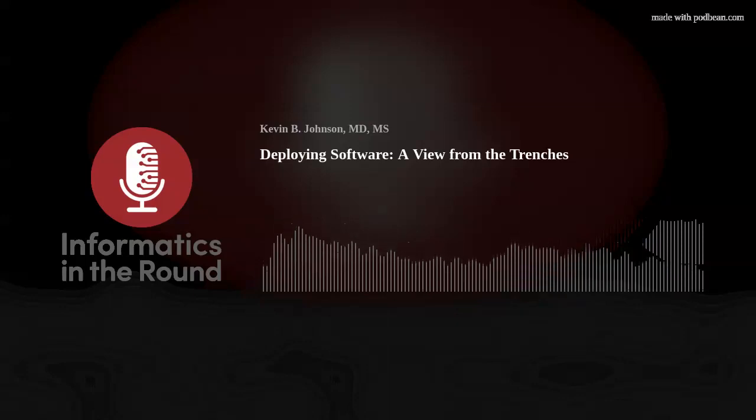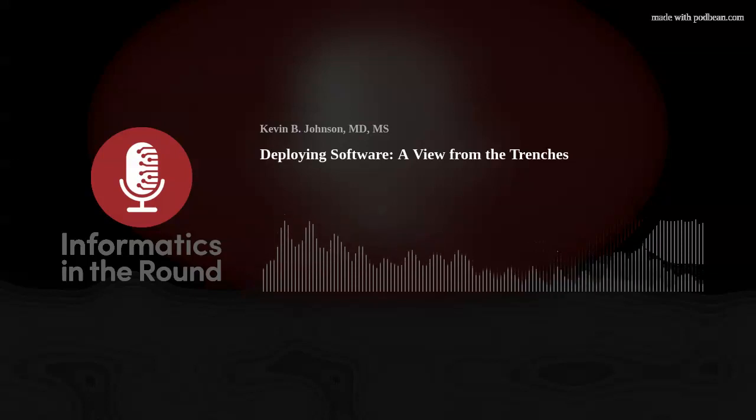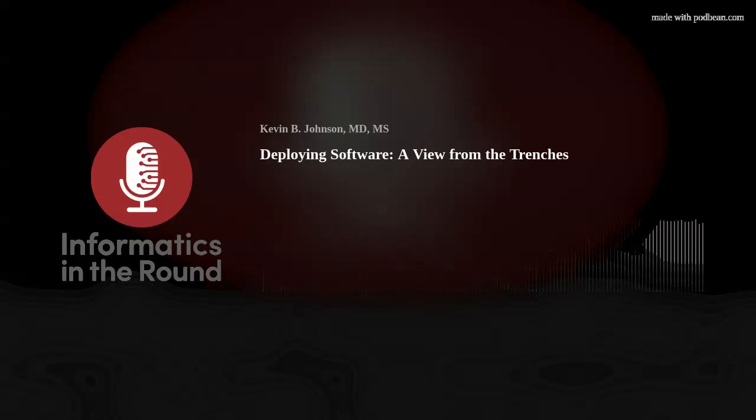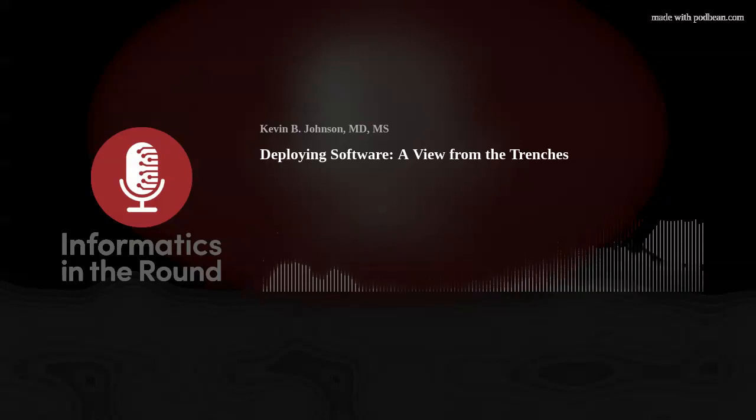to go live. And actually a bunch of challenges happened there, which is typical, which is the more we used the system, the more we found out the things that we built actually didn't work the way we wanted it to. So we had to train them, and then we built materials, and then we found out that that was wrong. So then we built new materials and retrained them. And then every single day that we were live, we were busy fixing things. And every fix had a whole new set of materials that we had to train. So all of that infrastructure costs a lot.